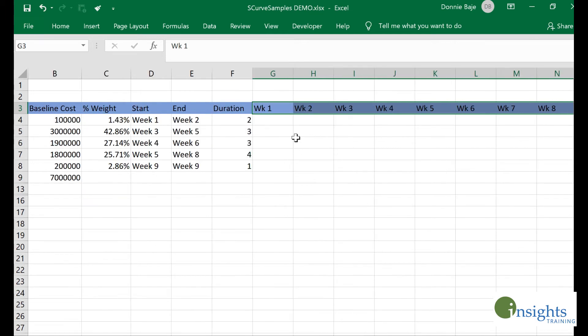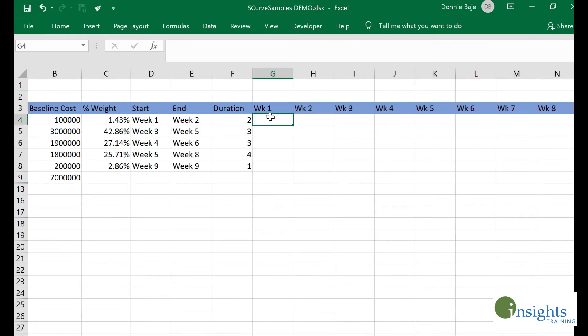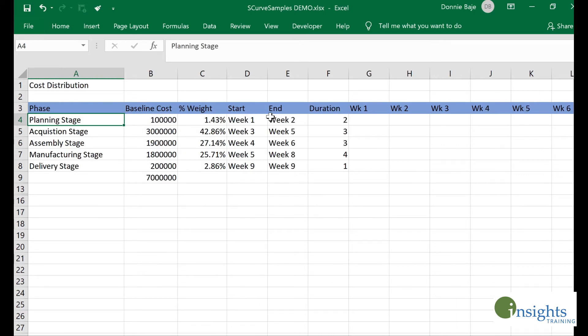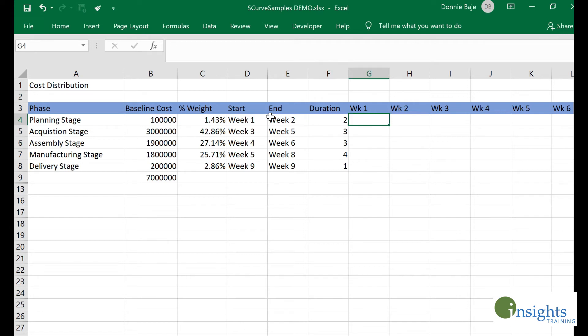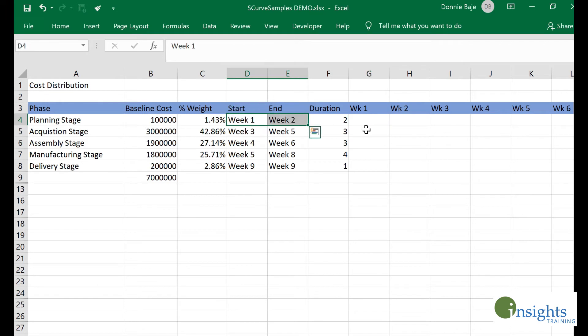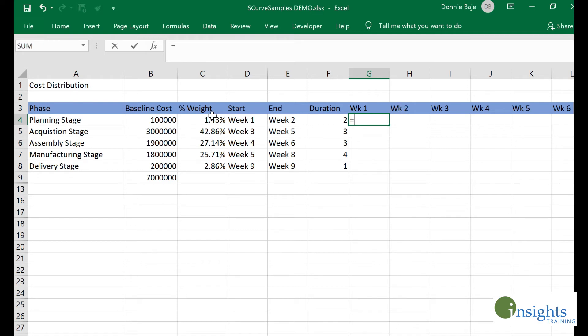Next, I'm going to plot the percentage that the weight is going to be distributed among those weeks. For example, this stage is plotted for week one until week two, so I will start at week one.